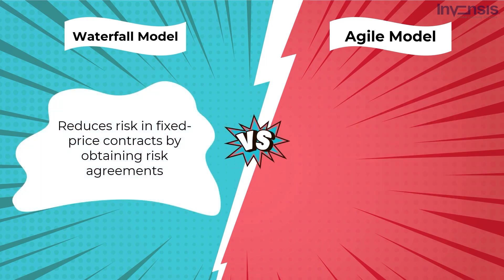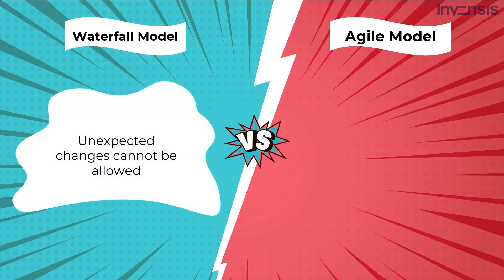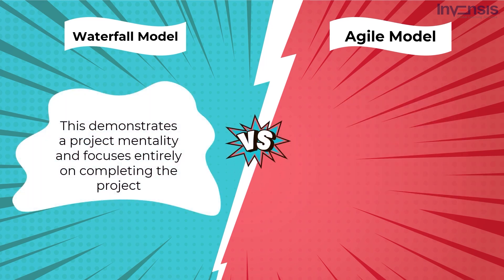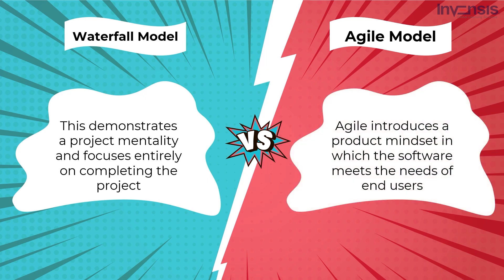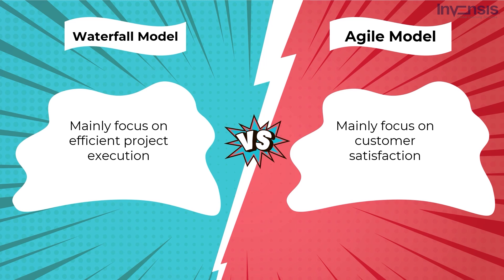The Waterfall model reduces risk in firm fixed-price contracts by obtaining risk agreements early in the process. With time and materials or non-fixed support, Agile methodology works incredibly well, but in fixed-price situations it can increase stress. The Waterfall model is suitable for projects with specific requirements where unexpected changes cannot be allowed, while Agile development expects requirements to alter and evolve. Waterfall demonstrates a project mentality focused on completing the project, while Agile introduces a product mindset focused on customer satisfaction.